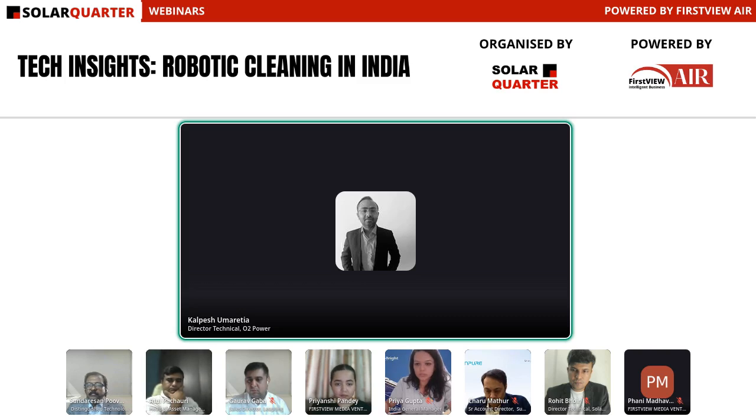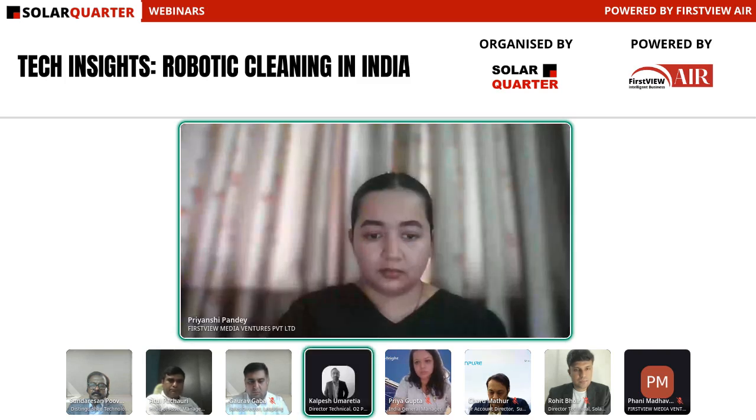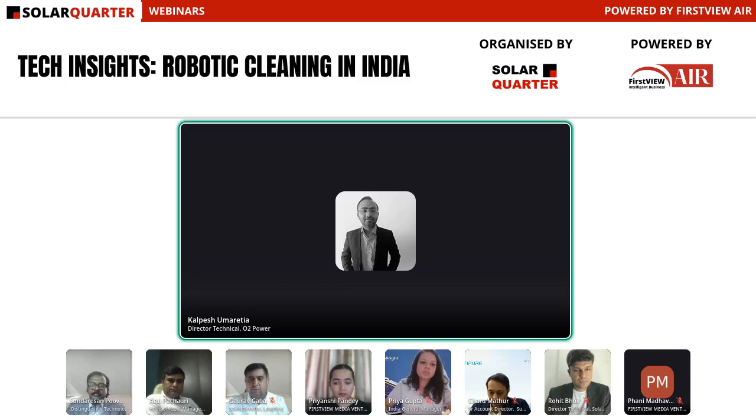Secondly, we consider one training session for our site technicians during installation. The OEM will come down to site and train the technicians on how to replace each and every component. So you have spares available, and you have a trained technician to replace them. Whenever there is a fault, you can take remote support from the OEM and replace that part. I think that model is perfectly working for us for all our small projects.